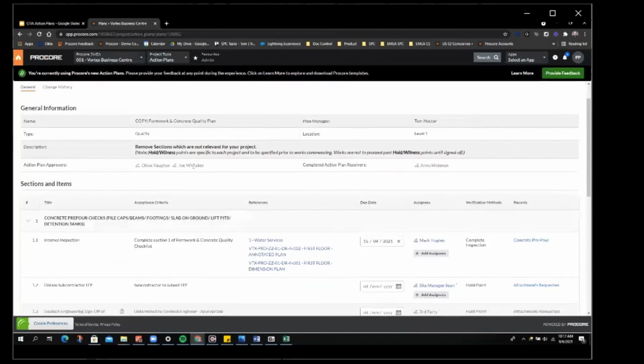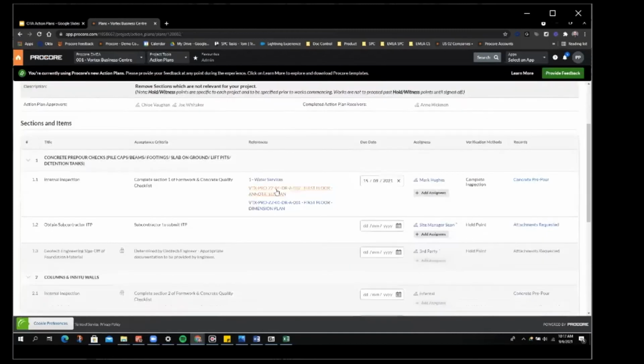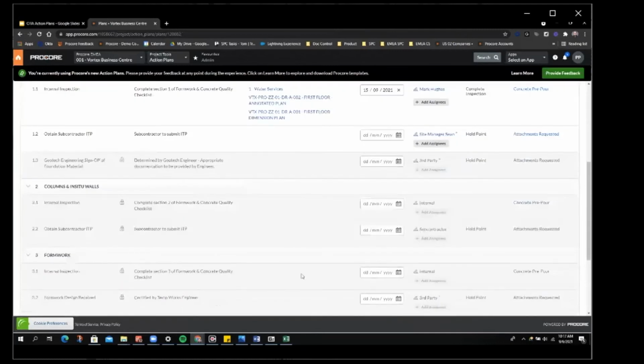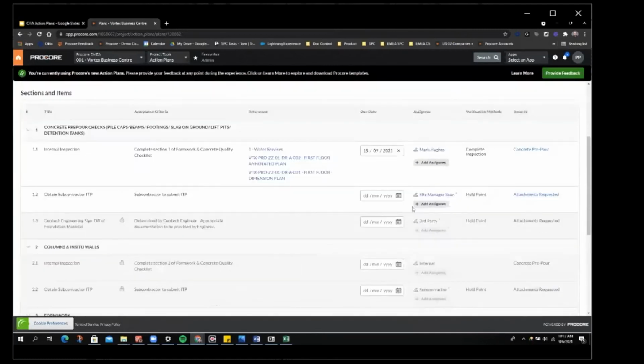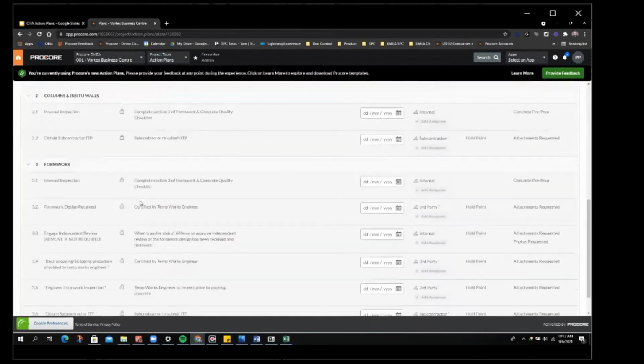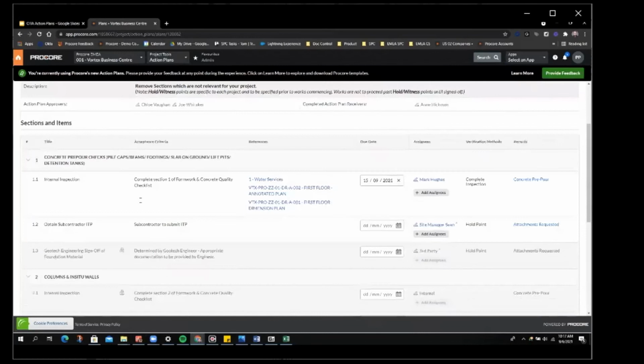What you can see here is that the first item of the plan is the only item that can be signed off, the first two, should I say, can be completed before we deliver the rest of the plan. And this is due to the blocking functionality being built in, meaning that until line item 1.2 has been signed off, you cannot complete any other activity on the action plan itself. This is critical to ensure that your plan is being adhered to in sequence as you've set it out to be completed.